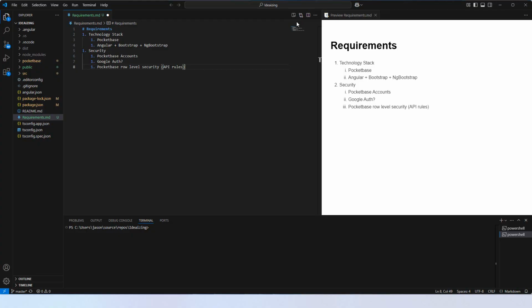You should figure out a way to clearly show which items in your list you have committed to and which items you haven't. You might bold the items you're committed to or italicize the items you haven't. Just be consistent and don't go overboard with too much styling. If you can't find a way you can live with, leave the uncommitted items completely out of this document or put them into their own section. For me, everything in this document that doesn't end with a question mark is considered to be committed. This works for me, and I use the same style in every requirements markdown that I do.